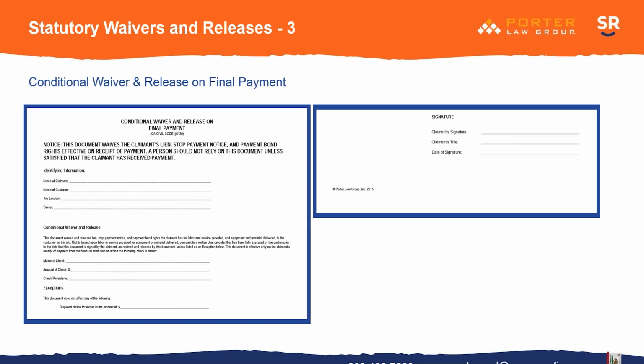Like, for example, with a mechanics lien, it'll be in California. If there's a notice of completion and you're a sub, you may have as quickly as 30 days to record a lien. Or if you're the prime contractor, 60 days, or if there's no notice of completion, it could be 90 days. And then you have to file a lawsuit 90 days after that. So pay attention to these deadlines, because they could come up on you. And even though you're resolving all these issues, maybe this disputed issue, don't miss your deadlines, because the owner is waiting for you to miss your deadlines. But that's another subject, but it's so important. I wanted to mention it in this because it's kind of the next thing that happens.